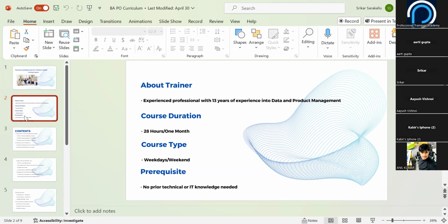Clear, right? Now we have a new role called Scrum Master. So what will the Scrum Master do? The Scrum Master will be driving the team, driving the project. His responsibility is mainly to schedule the calls, like the sprint planning call, daily stand up call, retrospective call, and sprint demo call. He will be acting as a bridge between the technical team and the product team.